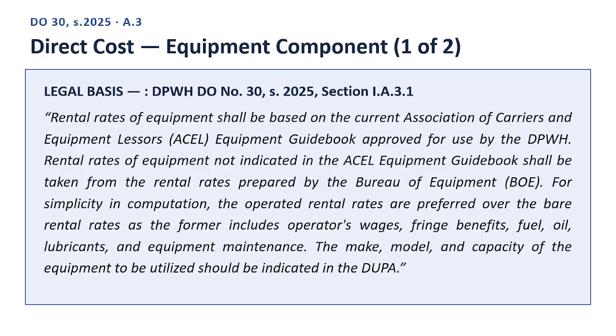For simplicity in computation, the operated rental rates are preferred over the bare rental rates, as the former includes operators' wages, fringe benefits, fuel, oil, lubricants, and equipment maintenance. The make, model, and capacity of the equipment to be utilized should be indicated in the DUPA. End quote.